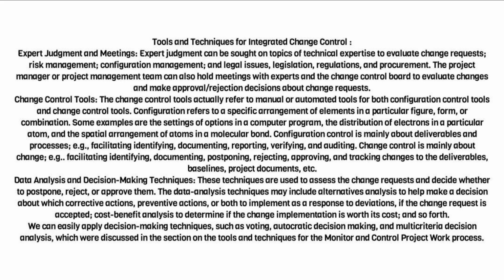Configuration control is mainly about deliverables and processes, for example, facilitating identifying, documenting, reporting, verifying, and auditing. Change control is mainly about change, e.g., facilitating identifying, documenting, postponing, rejecting, approving, and tracking changes to the deliverables, baselines, project documents, etc. Data analysis and decision-making techniques.